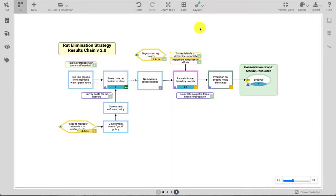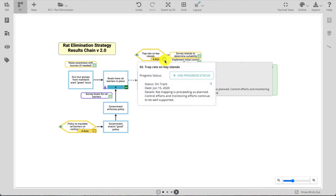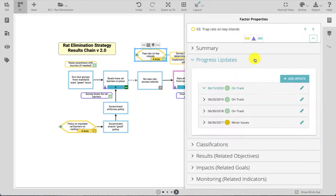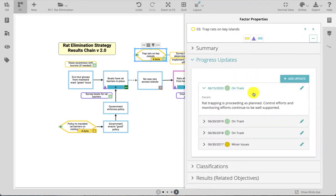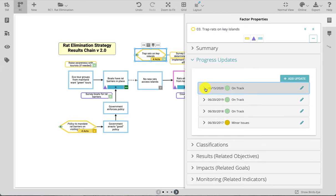Strategy and activity progress status is viewable and editable using the same tools. Hover over the status light in order to see the most current status report. Click once on the status light to either add a new progress status if you have editor permissions, or for any viewer of the project, view all current and past status reports for the strategy or activity.